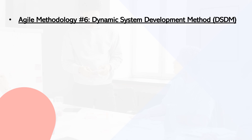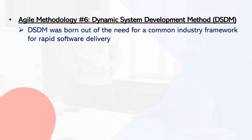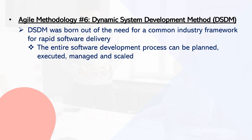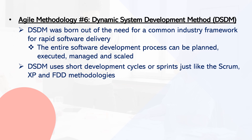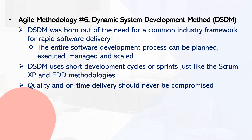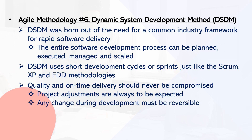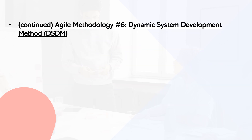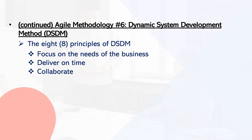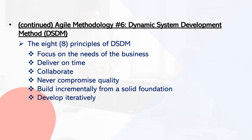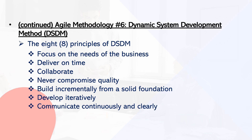Framework number six: Dynamic Systems Development Method (DSDM). DSDM was born of the need for a common industry framework for rapid software delivery. Using DSDM, the whole software development process can be planned, carried out, managed, and scaled. Like Scrum and other agile methodologies, DSDM uses sprints. It believes quality and on-time delivery must never be compromised, project adjustments are always expected, and any development changes must be reversible. DSDM is based on eight principles: focus on the business need, deliver on time, collaborate, never compromise quality, build incrementally from firm foundations, develop iteratively, communicate continuously and clearly, and demonstrate control.